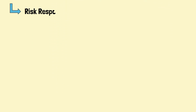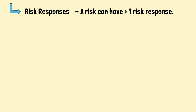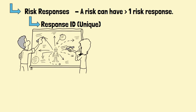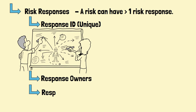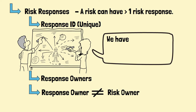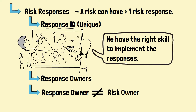Risk responses are definitely required in the risk register. Each risk can have more than one risk response in order to ensure the risk can be managed effectively. Similar to risks, each response will have a unique ID, which can help identify the responses easily. Of course, each response will have a response owner. The response owners can be different from the risk owner, as most of the time the implementation of risk response requires certain skill and expertise. It is always prudent to assign the person with the right skill to plan and implement the response.